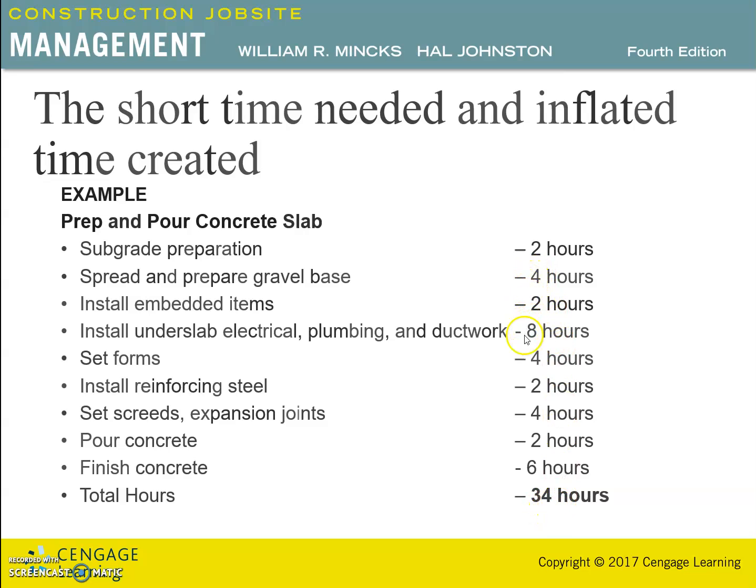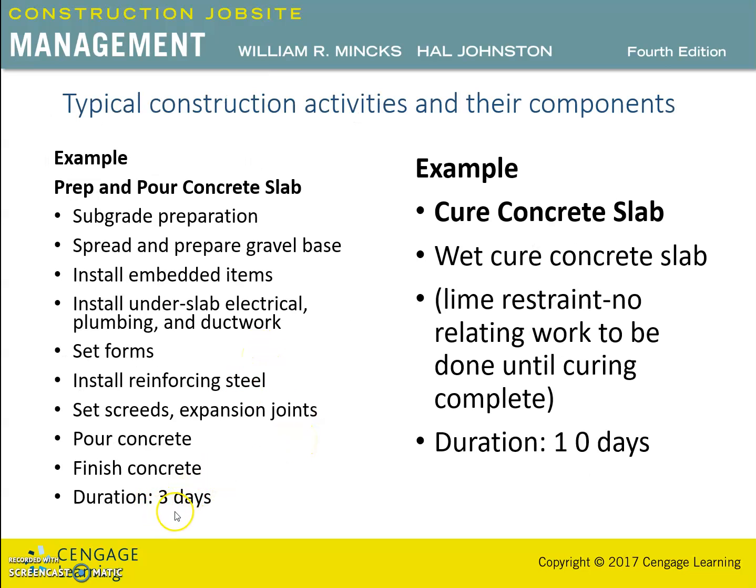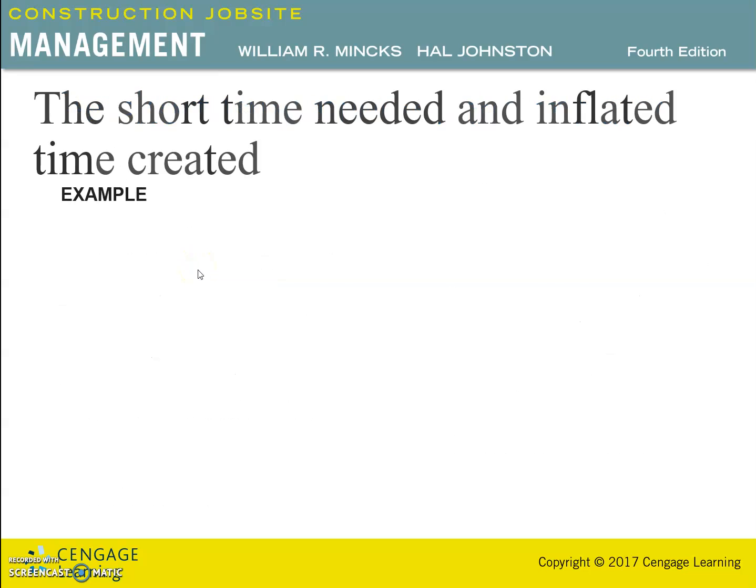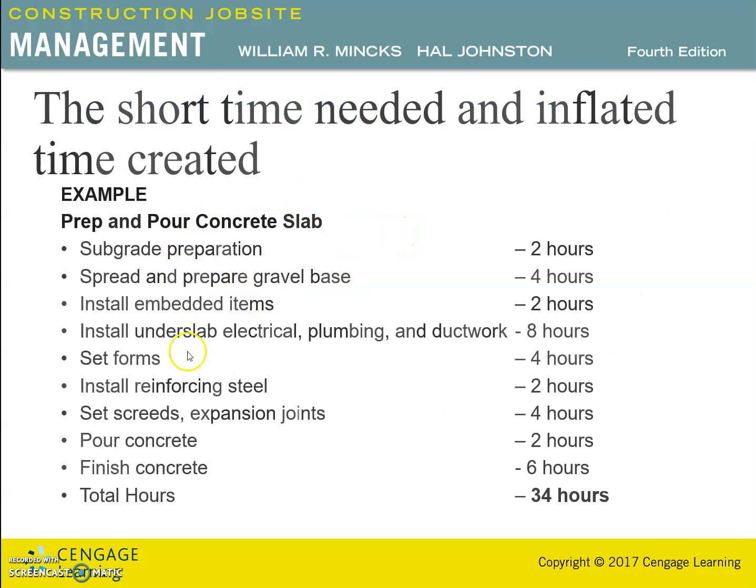However, not every activity is performed in a series. That means one activity after another. Many of these activities in this case may be performed in parallel. So therefore, we can have a duration of 3 days for these types of activities. If some of those sub activities are performed in parallel, then that 34 hours duration can be completed in 24 hours.